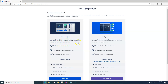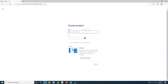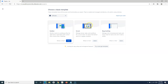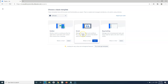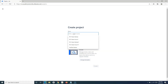To create a classic project, simply click on Classic Project. To create a scrum project, you simply have to pick the scrum template. The scrum template is basically more suitable for the product development team. Simply select that and the template will be set.